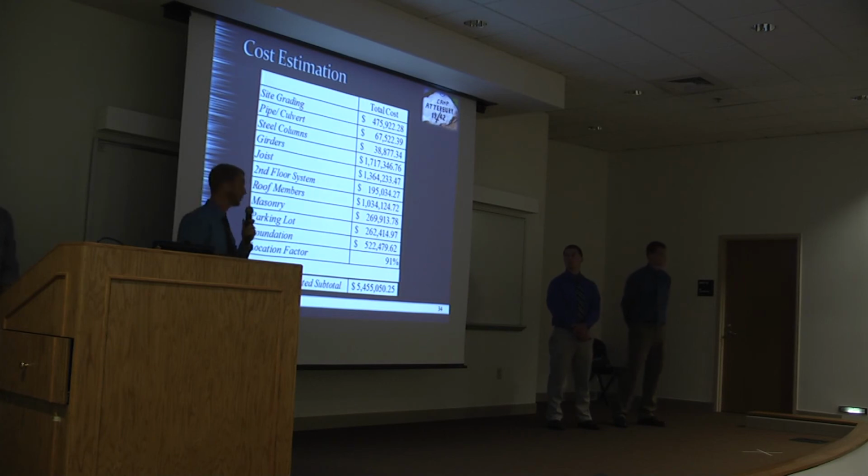So at the end of our project, we did a total cost analysis for our project. This was broken down into many different categories and subcategories. At the end, we tacked on a 91% location factor. This was due to the Indianapolis region. This gave us a total amount of just under $5.5 million.